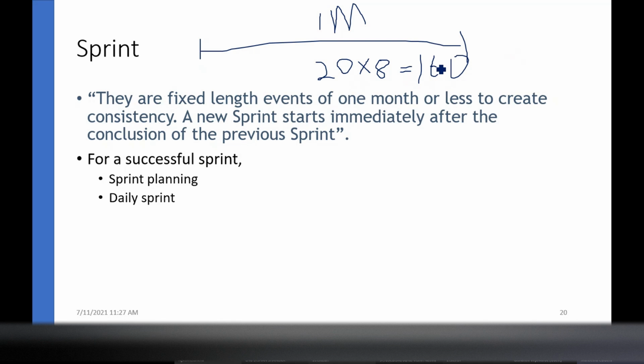Man hours are only 160. Though it's very small man hours, we have to plan it well. What are the highest requirements? How are the leaves planned? What are the problems that can occur? What are the non-technical issues? What are the non-bugs? How do we deliver by these dates? What are the planned leaves? What are the unplanned leaves? There might be unplanned leaves. Likewise, everything we have to plan properly.